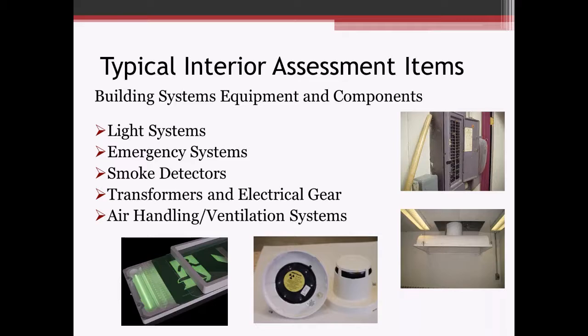Smoke detectors, as you see in this picture, there are types of smoke detectors that will have radioactive materials, and you'll often be able to tell if you can disengage that cover. You'll see the radioactive symbol there. It will have some small amount of radioactive material, but any amount of radioactive material really requires special handling and disposal.